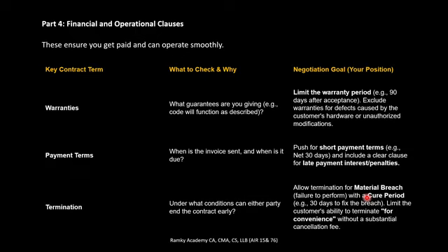In those cases, the customer has to give certain deadlines to fix the bugs or any kind of mistakes in the software. Even after the time limit of 30 days, if the supplier is not able to fix that requirement, then the customer has the right to terminate the contract for convenience and without substantial cancellation fees.